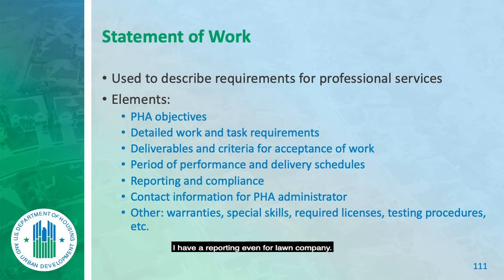Yeah. I have reporting even for lawn cutting. They're to tell me of any unsafe conditions. They're to tell me about stumps. My janitorial contractor was telling me about outlets that are hanging down. Yeah, I have a reporting requirement with every contract.